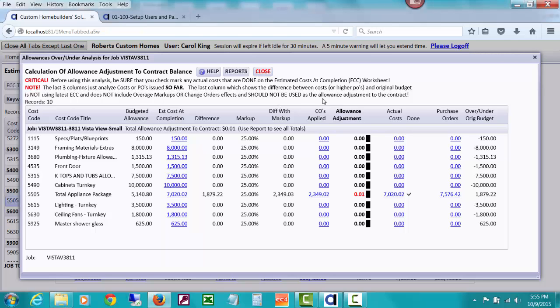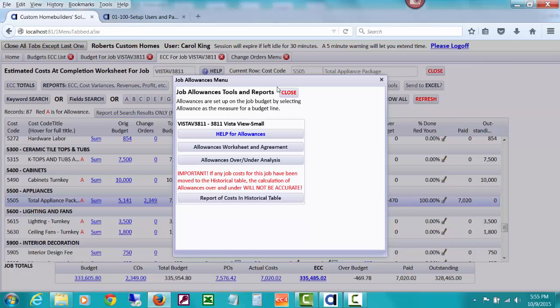And the reason CHS goes ahead and applies this and takes down the adjustment is, again, so that we don't try to collect a change order and an allowance overage, which is double dipping, and I think the buyers might object to that.